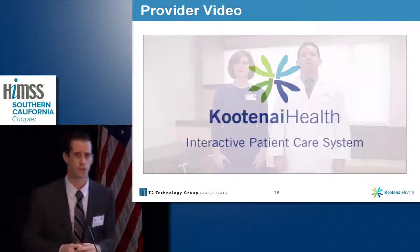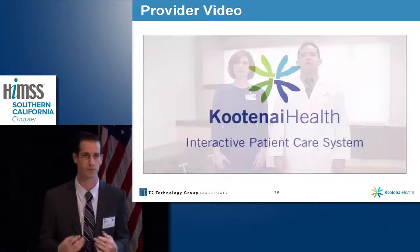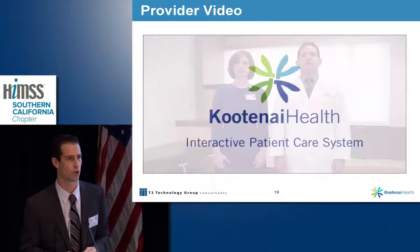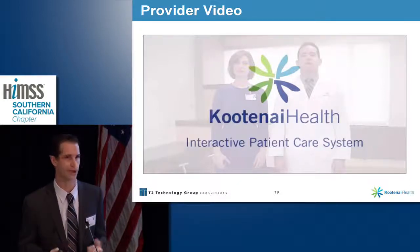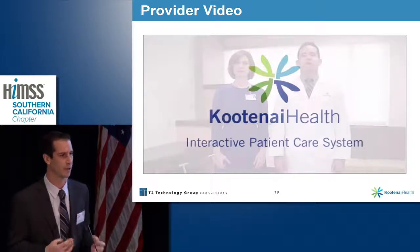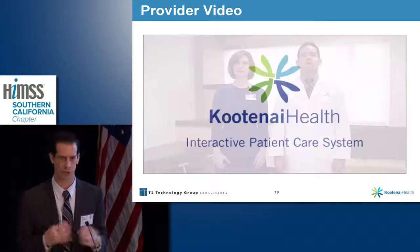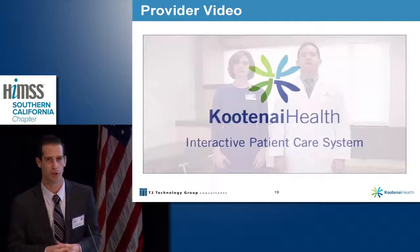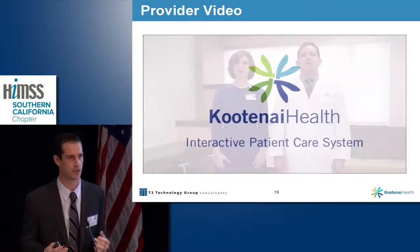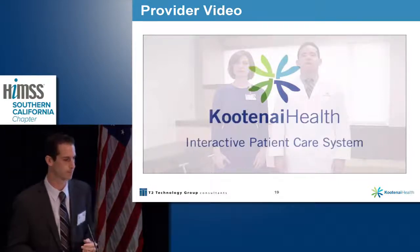So with the support of the CMIO, we were able to recruit physician champions for the system who helped us evangelize the project amongst the community and really got people excited about it and got the providers to see all the good points that were coming along with some of the things that were going to get taken away. And what we ended up doing was creating a short video for them to watch that helped them further educate themselves on how they could use the system well and how they could engage with the patient using the system.